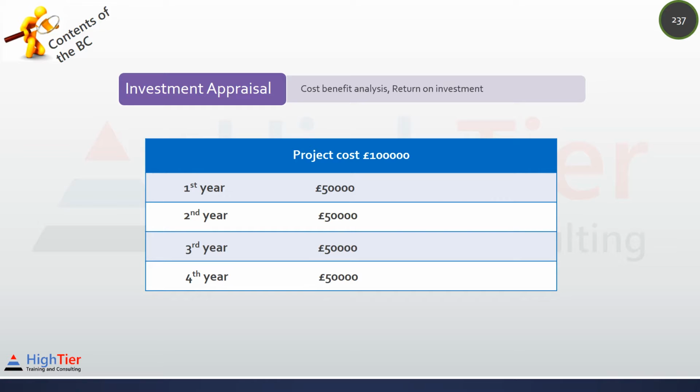Looking at this figure, we may assume that the project is brilliant and decide to go ahead with the project, as after 2 years we will break even. But we have not included the operations and maintenance cost. For example, there is a cost of 30,000 each year to maintain this system. Based on the new figure, you may decide not to do the project. It is very easy for people to miss this information. So in PRINCE2, under cost and time scale, we put the delivery as well as the benefit realization cost and time.